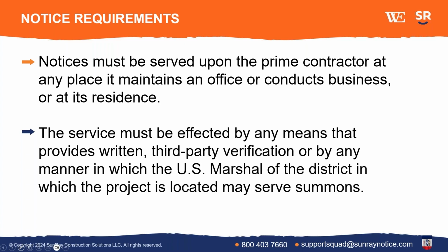So effectively, if the prime contractor gets the notice, even if technically it's not as outlined in the statute, you probably will be fine, with the caveat that it has to essentially be a third party who delivers that notice to the prime contractor.